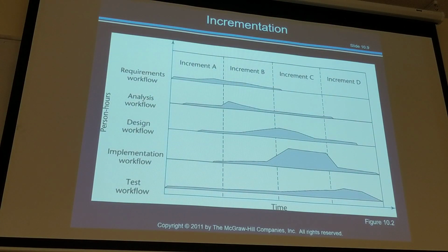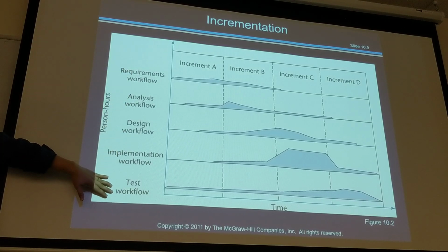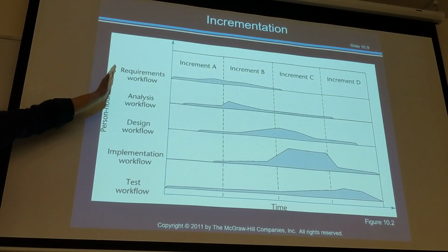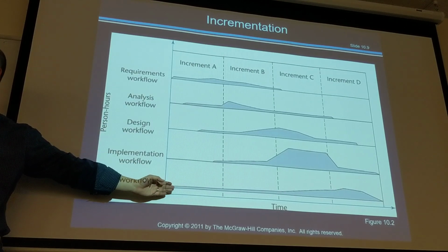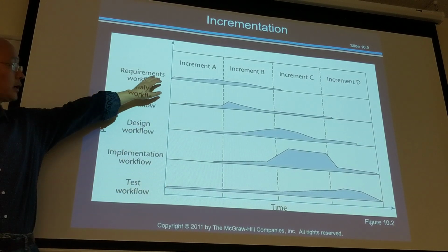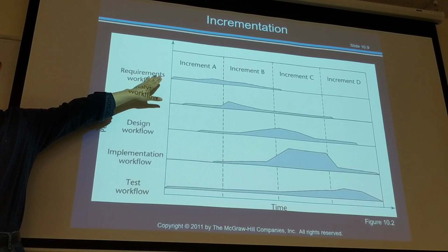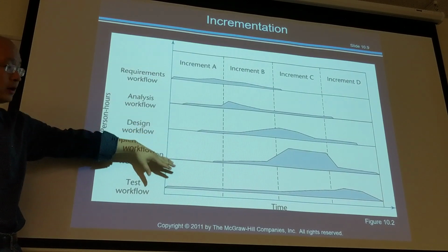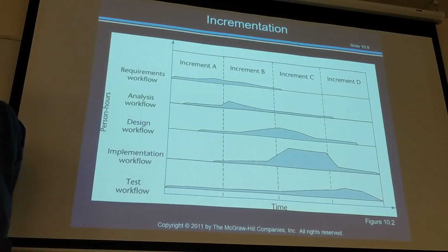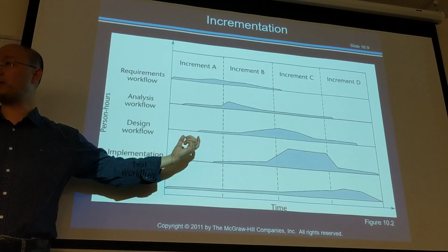So this is more likely the real situation you're going to see in a software development project. You're going to do requirement analysis, design, implementation, and test all the way. Okay? Day one of the project, you're doing all these things. Just the amount of work with regard to requirements is heavier toward the front, the beginning of the project, and more testing and implementation toward the end of the project. Okay?